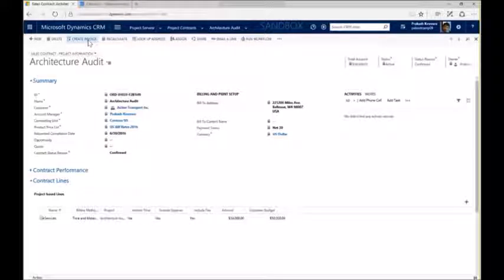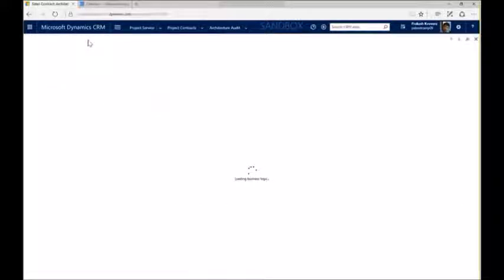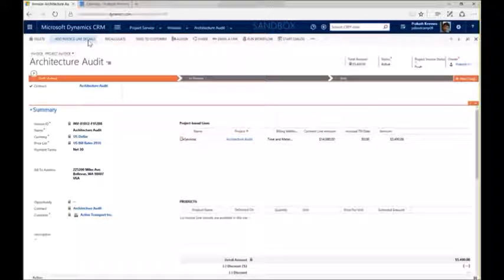Once I select that, it's going to generate a draft invoice for me based on anything that's eligible to date to be billed on that project, based on the invoicing schedule that I set up on that contract. So you can see that based on the activity and the labor and the time that we've put into that project, I don't have any expenses yet. I've just booked time to it. It's a T&M project. The services estimate was $14,000.